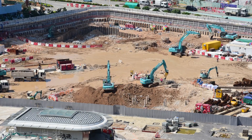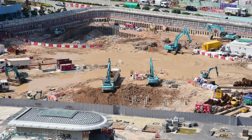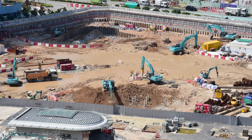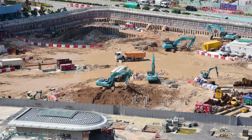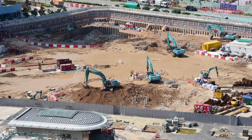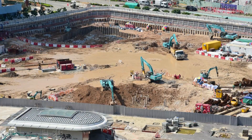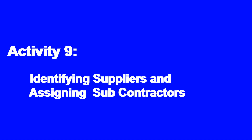Activity number eight: pre-construction material test. During the mobilization period, pre-construction material tests shall be conducted, such as concrete mix tests (which include all ingredients of concrete), rebar tests, soil tests, and so on. Once you process the test results of those materials, you will start deploying corresponding materials such as gravel, sand, admixture, cement, rebar, and other materials.